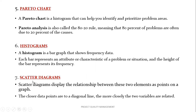The fifth is the Pareto chart. A Pareto chart is a histogram that can help you identify and prioritize problems to be solved. Pareto analysis is also called the 80-20 rule, meaning 80% of the problems are often due to 20% of the causes. The sixth is the histogram. A histogram is a bar graph that shows frequency data, where each bar represents an attribute or characteristic of the problem or situation, and the height of the bar represents its frequency.